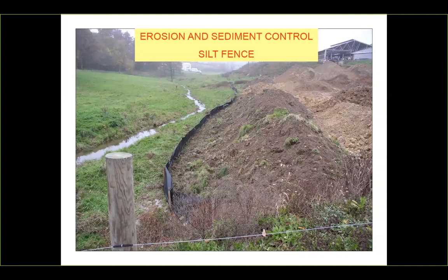You're downstream of your silt fence. Make sure everything is stockpiled in the location that was planned. And if that location needs to be changed, talk to someone. If you're not the one that's approving or has the JAA to approve that field change, make sure you get the appropriate approval for that.